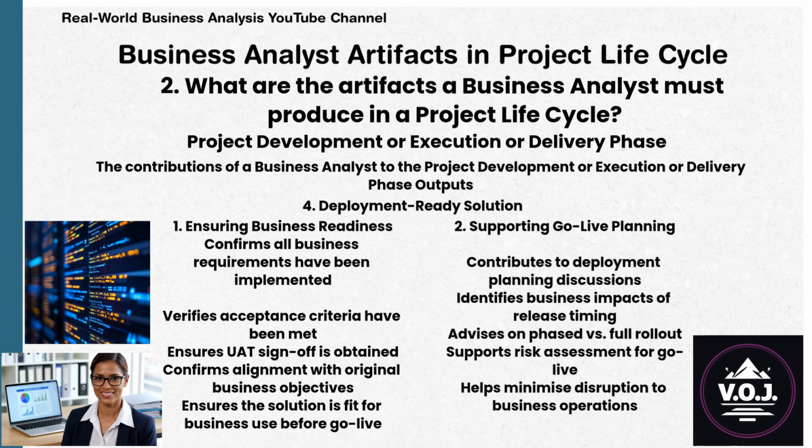The contributions of a business analyst to the fourth output, which is the deployment-ready solution, are: 1. Ensuring business readiness. The BA confirms all business requirements have been implemented. Verifies acceptance criteria have been met. Ensures UAT sign-off is obtained. Confirms alignment with original business objectives. And ensures the solution is fit for business use before go-live.